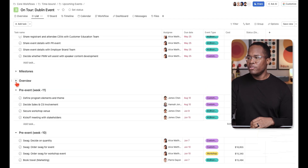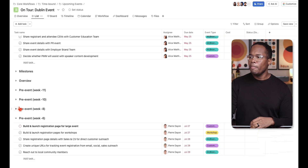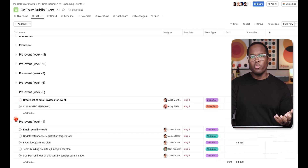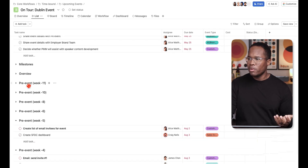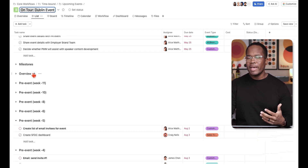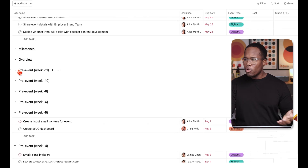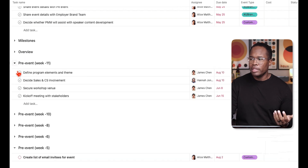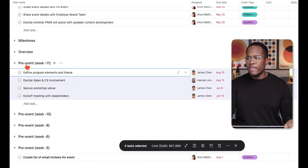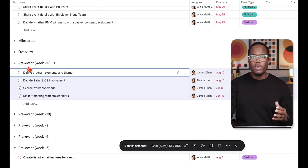The next term is sections. In some tools these are called swim lanes or stages. On a Kanban board it would be a stage or status that you're at. Sections are simply these headers right here — you can collapse them — and within each section is where you would group types of tasks. For example, in this event planning project the sections represent time periods, like 'pre-event week 11,' where all tasks within that section need to be completed by week 11.